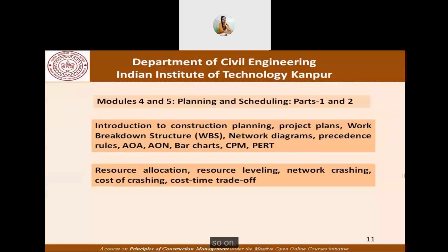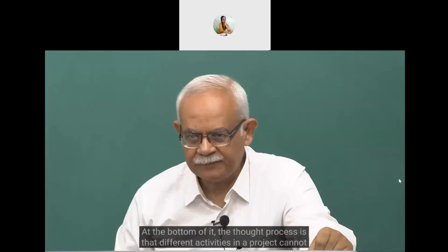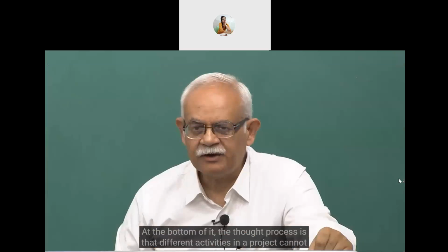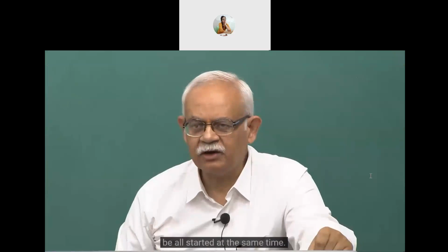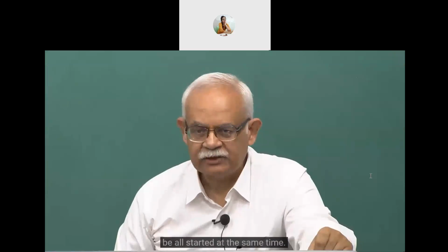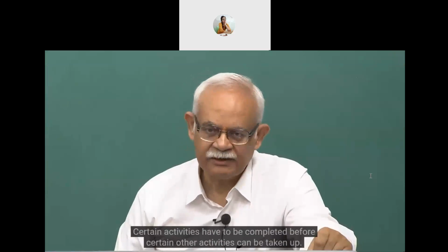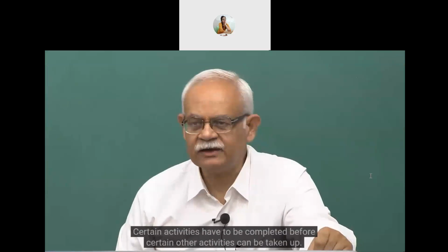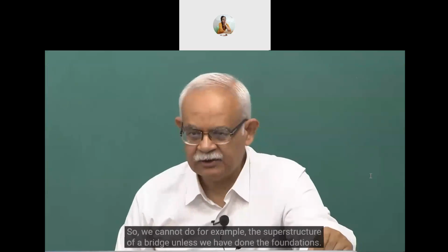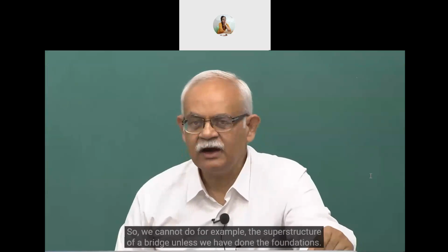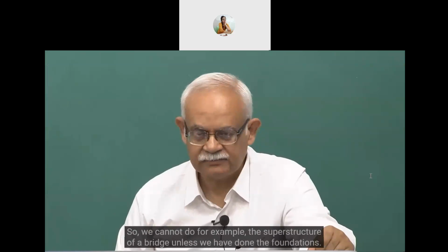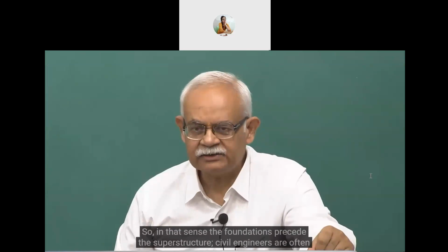At the bottom of it, the thought process is that different activities in a project cannot be all started at the same time. Certain activities have to be completed before certain other activities can be taken up. So we cannot do, for example, the superstructure of a bridge unless we have done the foundations. So in that sense, the foundations precede the superstructure.